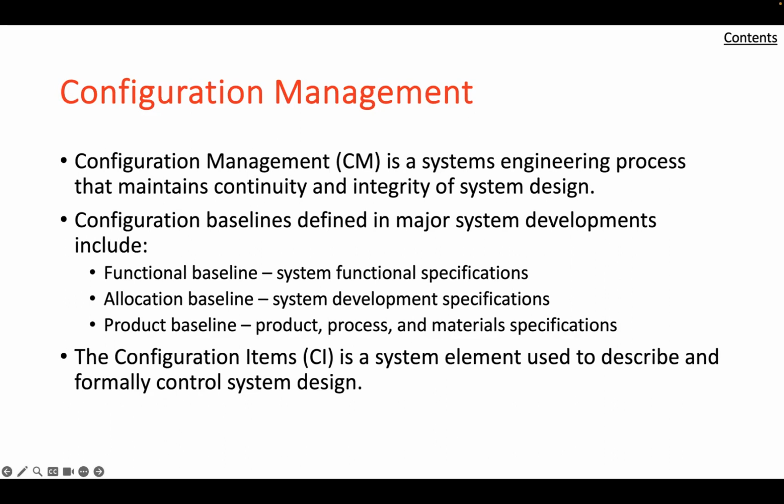The configuration management process generally begins incrementally during the concept exploration phase, which first defines the selected top-level system configuration in terms of functional requirements after a process of trade-offs among alternative system concepts. It then progresses throughout the phases of the engineering development stage, culminating in system production specifications. The configuration management process is described more fully in the material that we've covered, because the intensity and importance of configuration management is greatest during the engineering design phase.